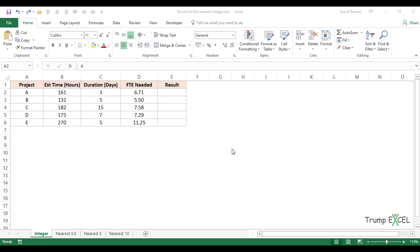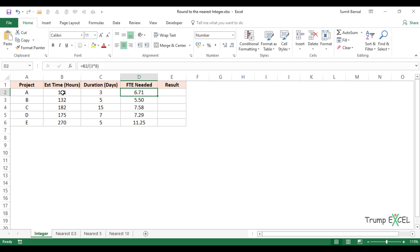Here is a simple dataset where you are a project manager with five projects. You do effort estimation and come up with the number of hours it will take for your team to complete these projects. The client has given you a certain number of days, so you calculate the total number of full-time equivalents or resources needed for each project. It's a simple calculation dividing by 3 into 8, considering an 8-hour work day. The problem is that I cannot allocate 6.71 resources on a project.